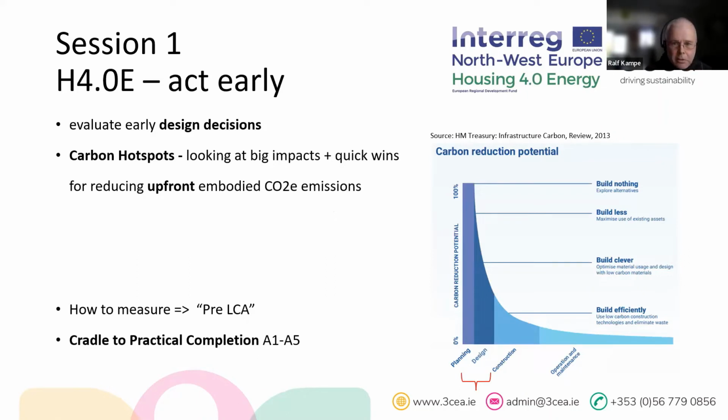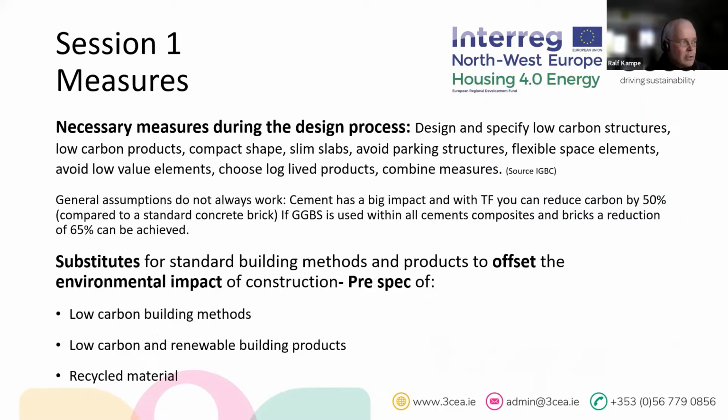So we need to evaluate the early design decisions, which influence the later design stages and the end result, and we try to do that with a pre-LCA, where we measure the difference between a baseline and the innovative construction types, and we used some other measures, but focus on wins, on carbon hotspots and how to mitigate them, and that is how we develop our pilots and this approach.